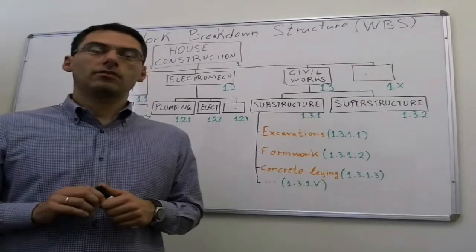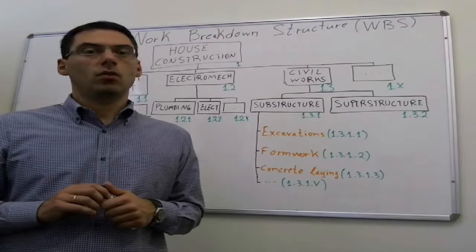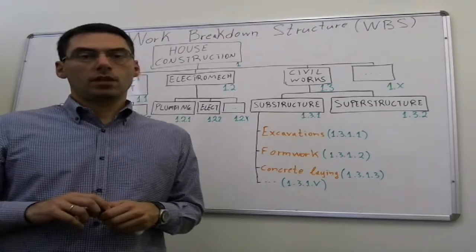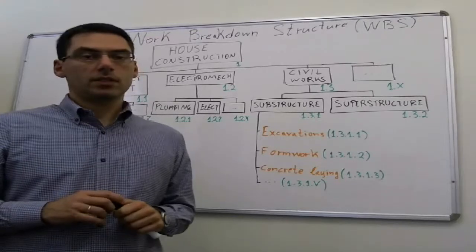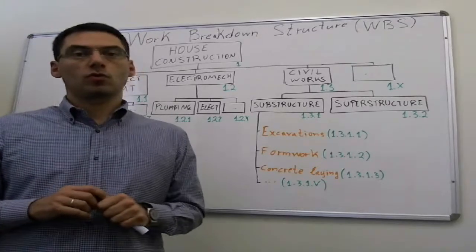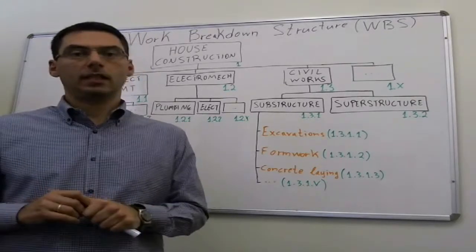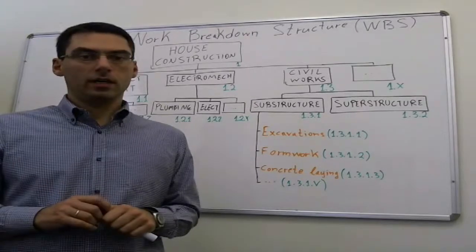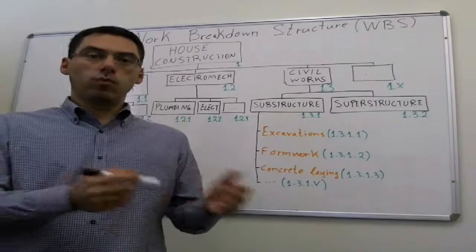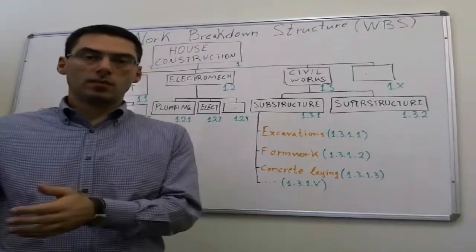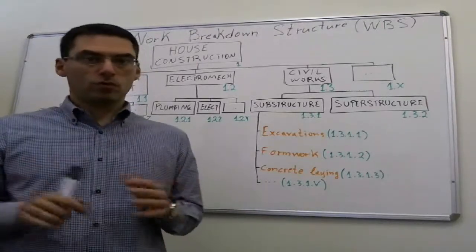A low-level activity should have more than one response. So, if you are putting, say, a work package which includes both plumbing and electrical works, this is not a good idea. Because then, the work package responsible will be both the electrician and the plumber. And for sure, you don't want that.